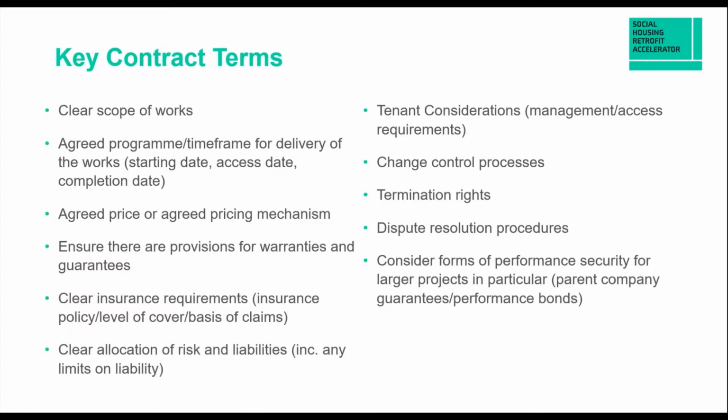Sometimes we find that local councils might have their own insurance policies which will deal with damage to their housing stocks. They either claim on their own policy or they can extend that to cover the contractor in a joint names capacity, or simply the case that the contractor has to obtain his own policy for existing structures. But again, engagement on this particular complex issue early is, I think, very important.